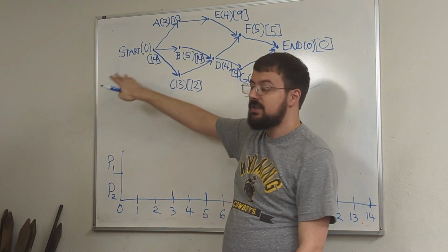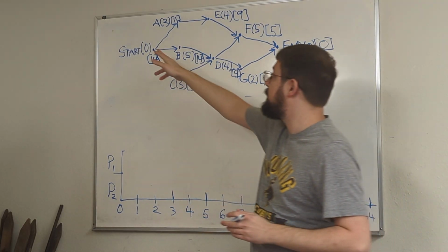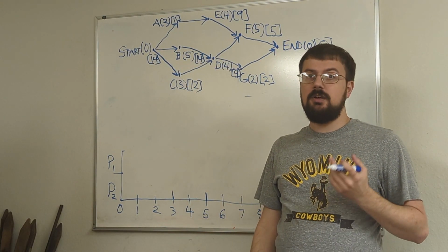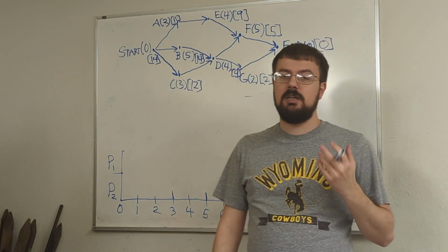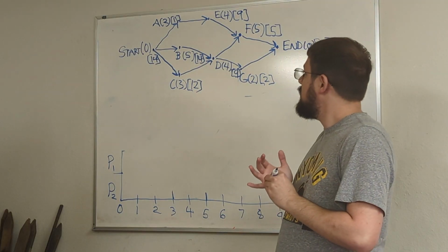This is basically the longest time for any path from the start to the end. Now, one thing about the critical time is that it is impossible to finish a project in less than the critical time.